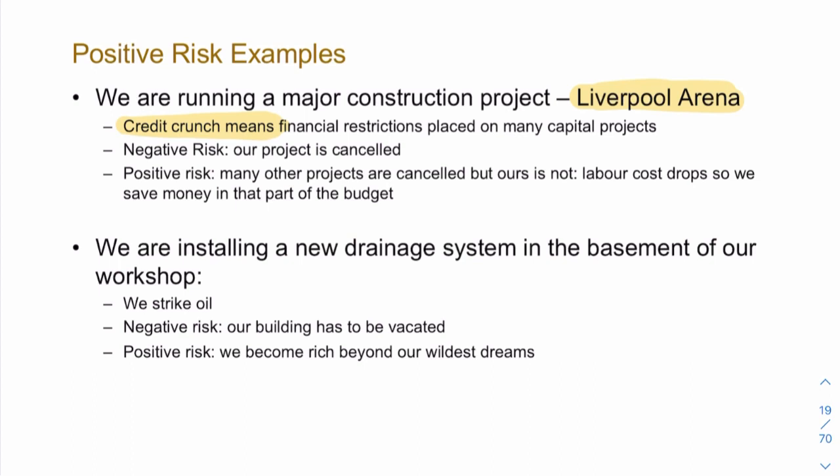But there is also a positive risk. If other projects are cancelled, but ours isn't, it means that there would be greater availability of labour. So it could be that labour becomes cheaper for us. Just as there is a negative risk, there's also a positive risk. Just as there are threats, there are opportunities.